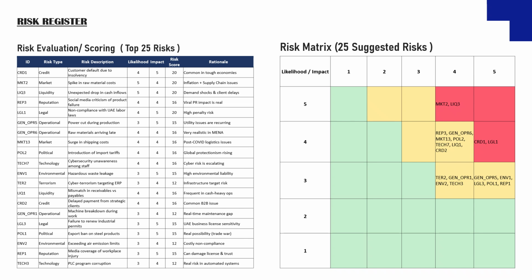Based on that, we created the risk matrix, as we see in the color table. Green means no action is required to mitigate. Orange is considered a mid-score, and red is the severe one, which is high risk.